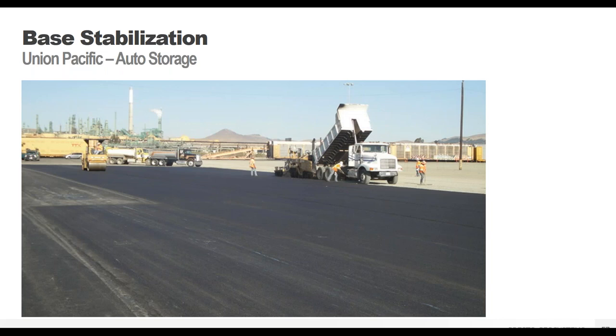And there's a 2 inch wear surface over top of the GEOWEB panels. Regular asphalt pavement was used. It was compacted with a smooth barrel roller. No special equipment or procedures are required with paving over the GEOWEB panels. So a paving crew could install, typically at their regular speed, without needing any existing training or additional equipment of any kind.